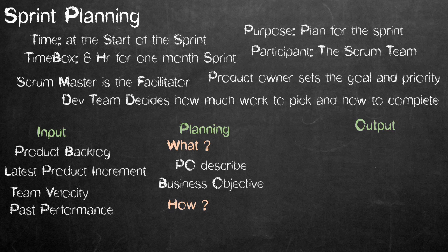During sprint planning, the Scrum team crafts the sprint goal, which is an objective that will be met within the sprint. Based on the meeting inputs, the number of items selected from the product backlog for the sprint is solely up to the development team. Only the development team can assess what it can accomplish over the upcoming sprint.